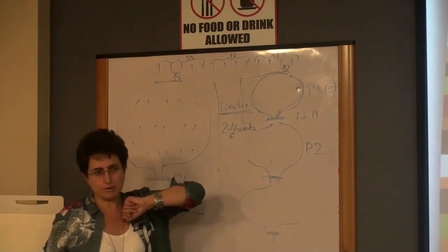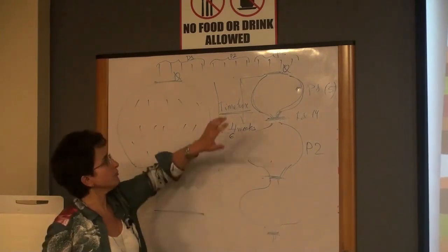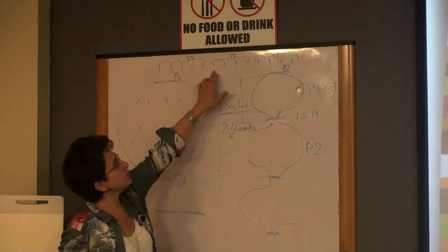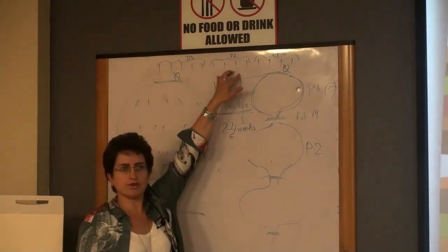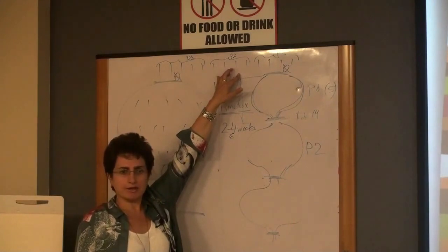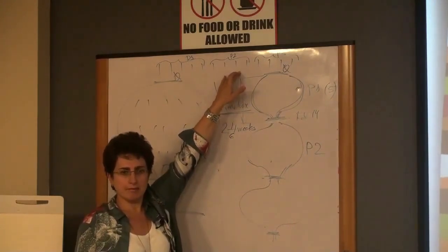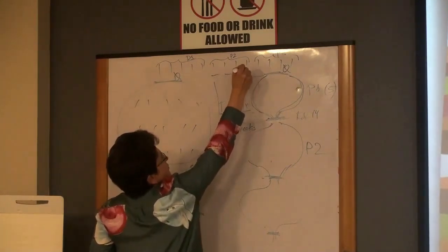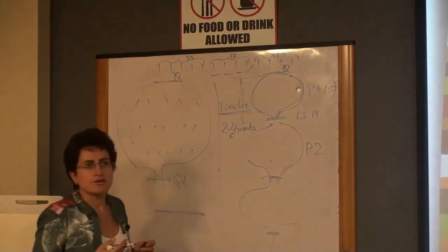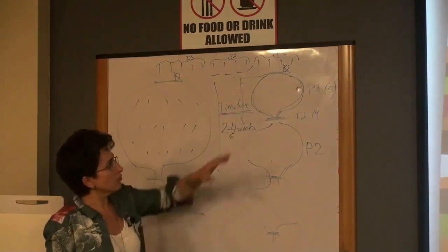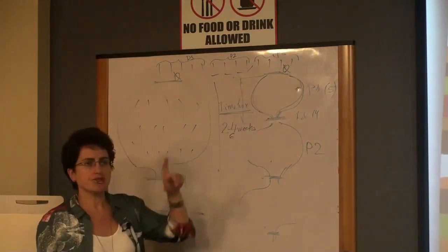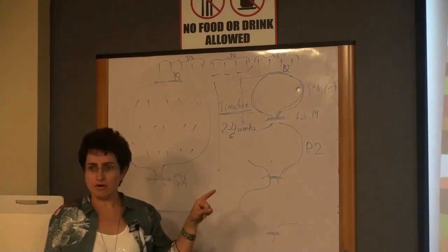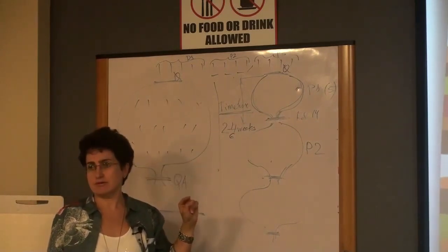So the product marketing guy can come to you and say, you know what, we wanted to do these 4 features as priority 2 features. But now the market changed, so the competitors released this and this and this, we cannot beat them. Instead, let's do this feature and this feature and this feature and this feature. So if you follow incremental development, then changing requirements on the fly is easy.